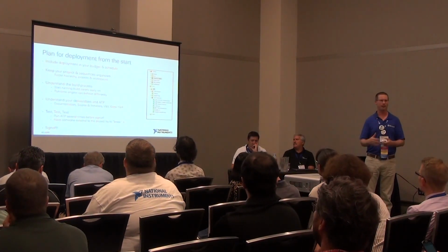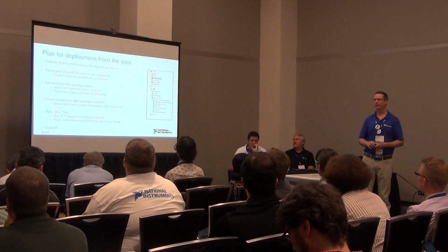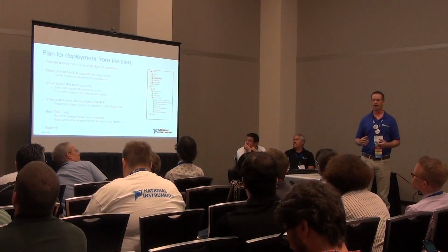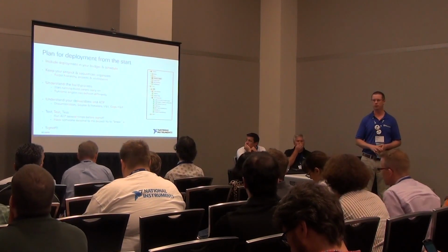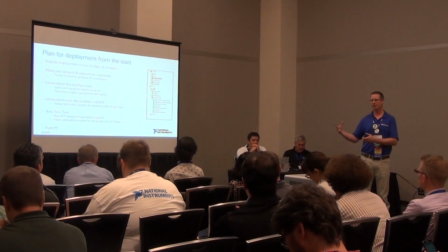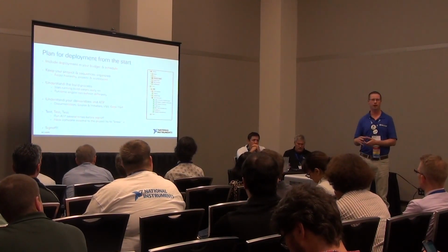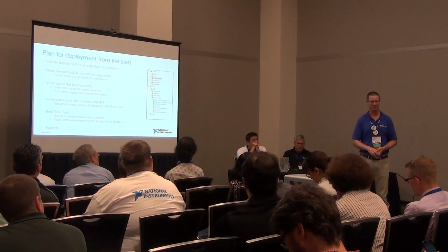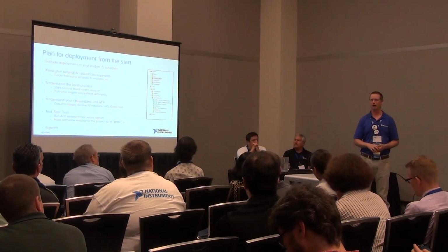And then finally, just test the system as much as possible. Don't leave test to the very end. Test it incrementally along the way. And if possible, bring someone else in who's external to the project to come in and try to use the system and build it. Oftentimes, managers are really good at this because they are going to see your project from a different standpoint. They're going to try to do things that you would never think of, and when they don't work and you say, well, I wouldn't expect anyone to use that, that's something an operator may do.